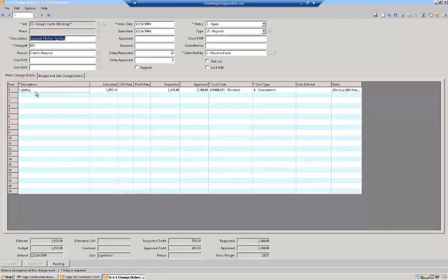And you'll find that I like to use things that are already typed because typing is definitely not one of my strong suits. So when you set up a change order, you only need a couple pieces of information to get this thing started off. You need the job, kind of a description. You can assign the change order number, or you can have the system assign the next change order in order for this project. It will default to the date that you start it. And then it'll always start out as open, and as it works through the process, like it comes back signed, you just move it to approved. It could go to disputed or reviewed status or rejected. So there's a couple different statuses, and there's two tabs here, and I'm going to flip back and forth so you can see.